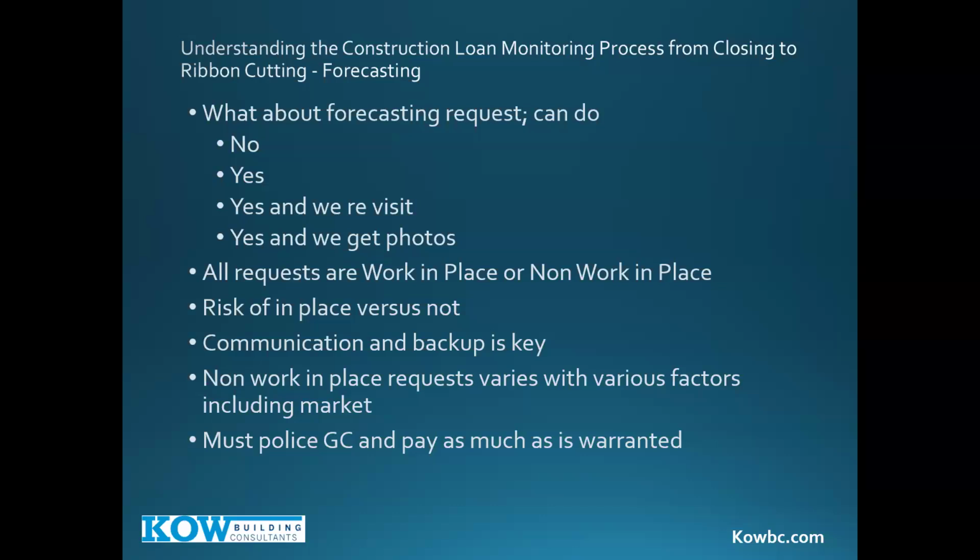Non-work in place is a risk question, and we're going to have a discussion with our client about that. That would be deposits, off-site stored materials, engineering, calculations, submittals. So there's a lot of factors with that. So we're going to have a discussion about that.